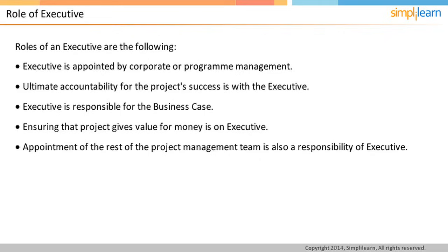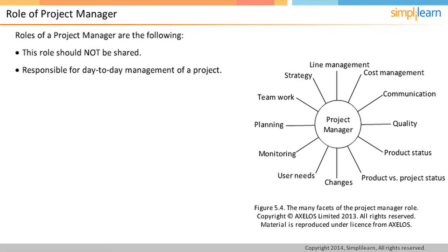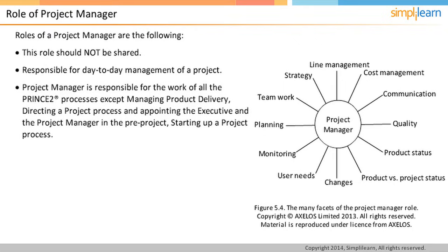Let's look at the role of a project manager in a PRINCE2 project. This role should not be shared. It is the project manager who is responsible for day-to-day management of a PRINCE2 project. The project manager is responsible for the work of all the PRINCE2 processes, except managing product delivery, directing a project process, and appointing the executive and the project manager in the pre-project starting up a project process. The project manager is responsible for liaison with project assurance and project board.